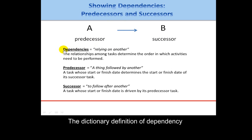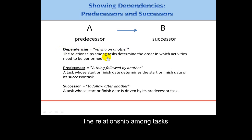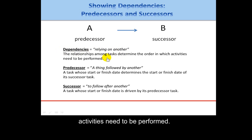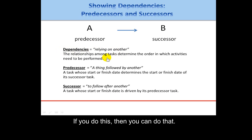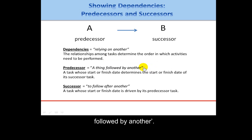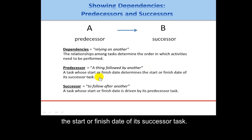The dictionary definition of dependencies is relying on another. The relationship among tasks determines the order in which activities need to be performed — it's a form of logic: if you do this, then you can do that. The predecessor is a task whose start or finish date determines the start or finish date of its successor task.